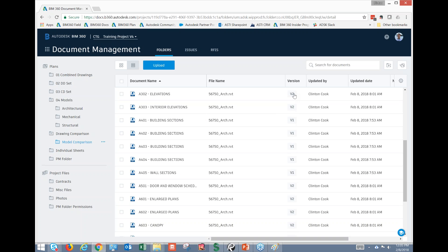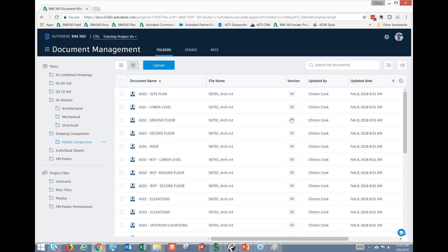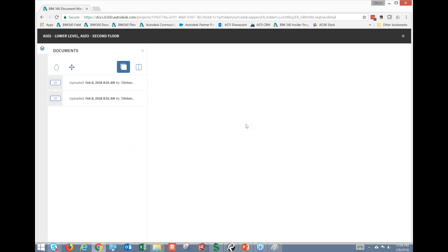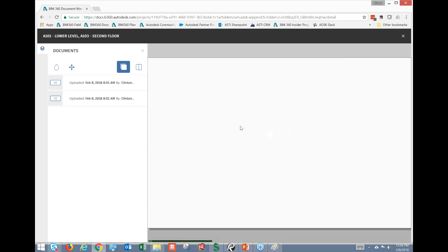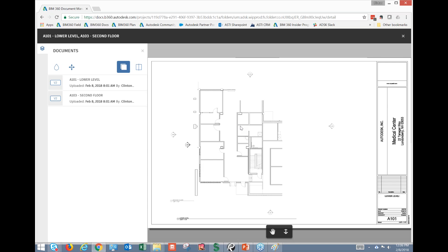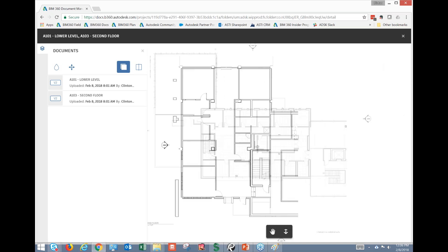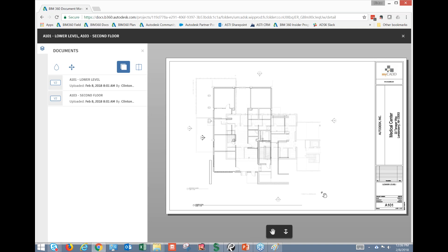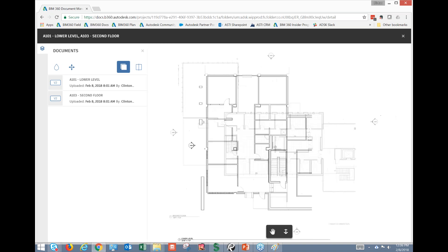This is the tip I wanted to demonstrate today — we have the ability to compare documents. If we go to Second Level and click the Compare option, we can start to see the differences between these two drawings. We can use the Align tool to drag and line up the columns and grid lines for better comparison. We also have the ability to use a slider bar to compare documents side by side.